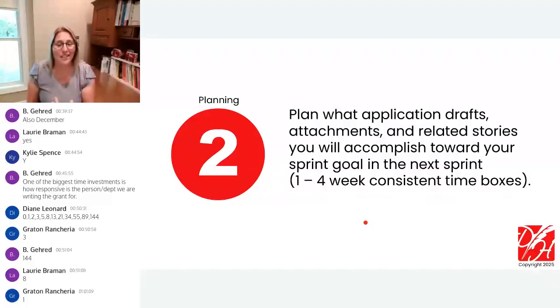But my colleagues, whether they call themselves a grant team or not, I need them to agree that they're available to help with that, or that they understand why this timeline is important so that we submit ahead of the deadline. So the meeting where you talk about planning for the next short period of time, 1, 2, maybe 3 or 4 weeks, no more than 4. But what you're looking for are what are the commitments that others can make? What is the capacity that they have towards getting this work done? Do you need to sit down for hours and hours and hours? No. You could stand there or meet on Zoom or on Teams and look at your digital board.